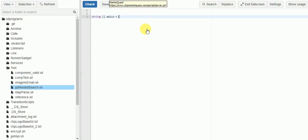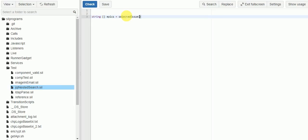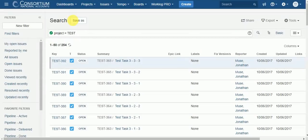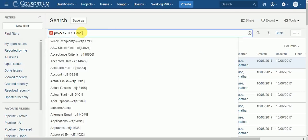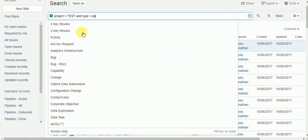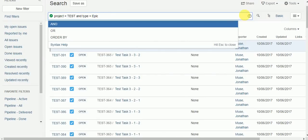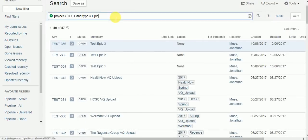We'll use the selectIssues function, which will allow us to run a JQL query. I'm going to hop back over to my project to build the query, and we'll say issue type equals Epic. That should give us a good place to start. We have 57 epics in total.